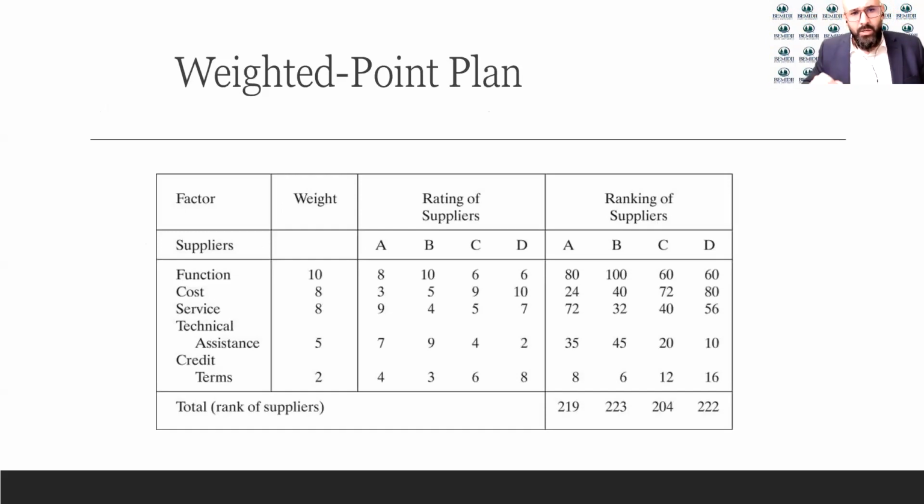You have different suppliers to select from, and you've selected function, cost, service, technical assistance, and credit terms as the criteria for selecting. Once you looked into these factors, you said, okay, on a scale of 1 to 10, function is more important. I need something that functions well and is easy to work with. So this is very important. I'm going to give it 10 out of 10.